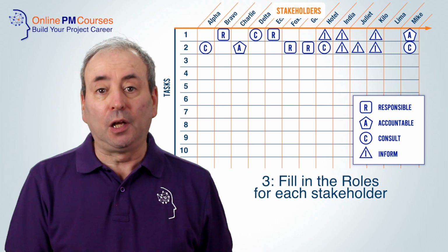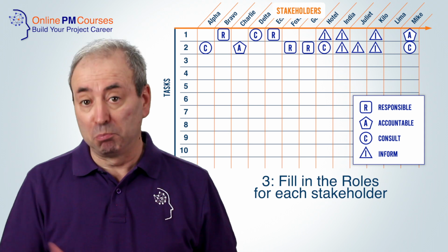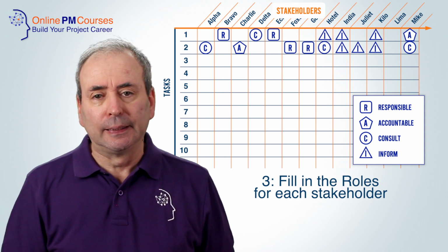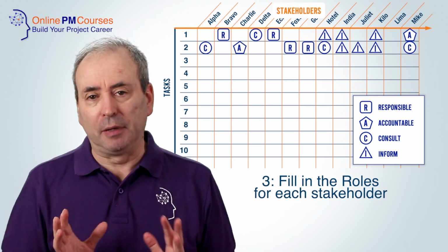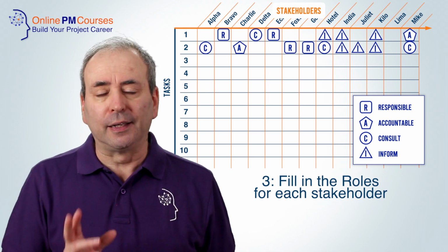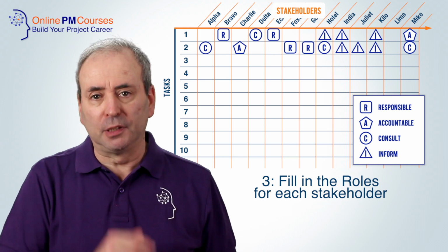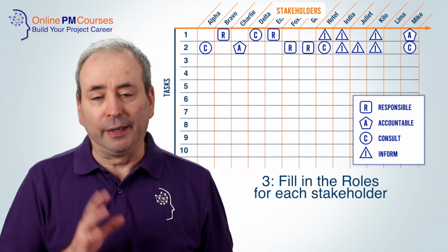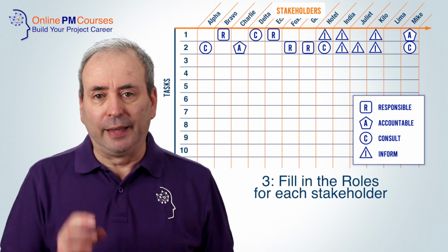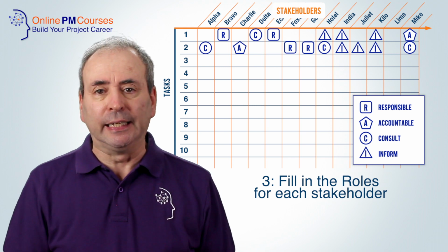The typical roles are the 4 RACI roles, but if there are other roles that are important to you, then go at it. And also, don't let anybody tell you that every cell has to be filled in, nor that an individual can only hold one role. If on your project it is right for a certain individual to have more than one role, and if on your project there is no role for a certain individual on a specific task, that is fine.